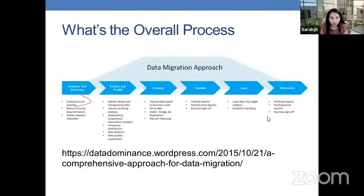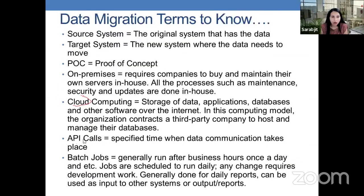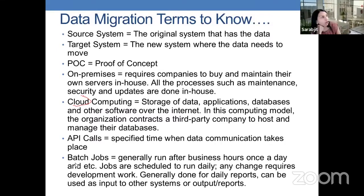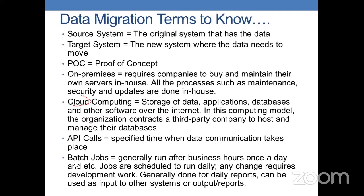Frequency of distribution relates to any jobs that may be created or scheduled on your systems. Anytime when we're thinking about moving databases and anything related from a system such as mainframe systems, you have to take into consideration any jobs that are being scheduled or are in place. Batch jobs could be a list of daily, weekly, monthly, or annual reports that come out of the system. So when planning a data migration project, you have to understand what reports are being generated out of that system.